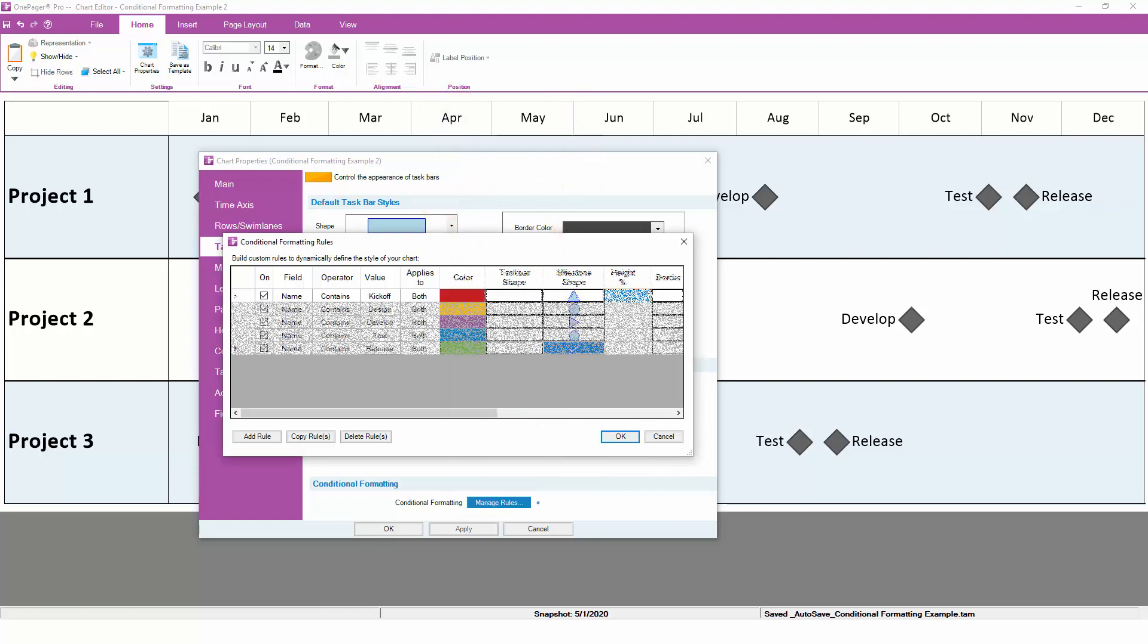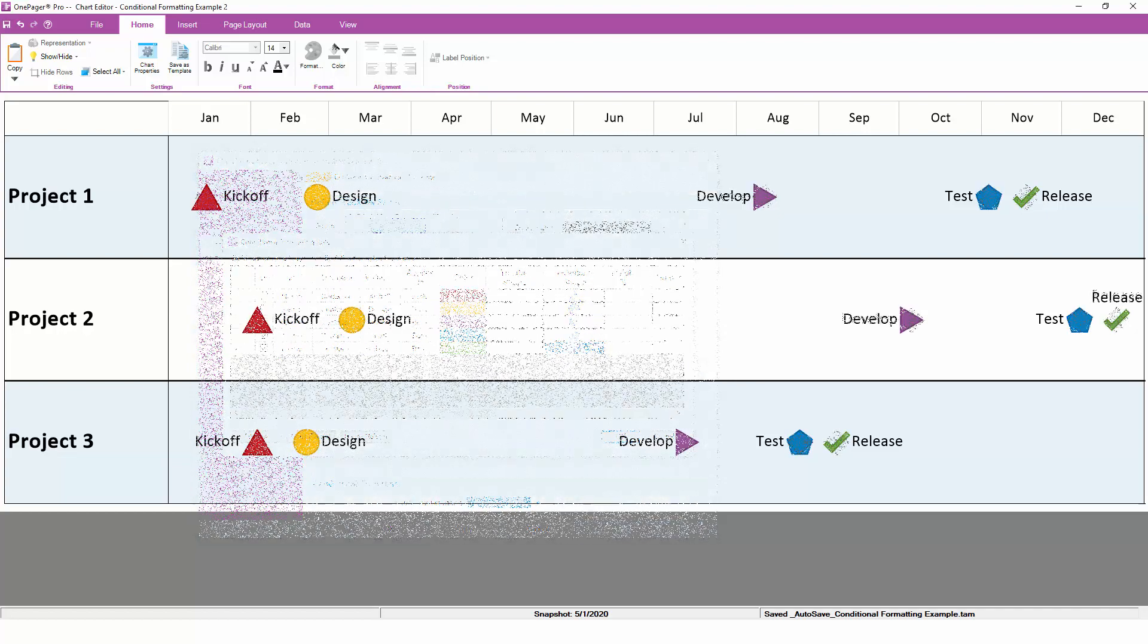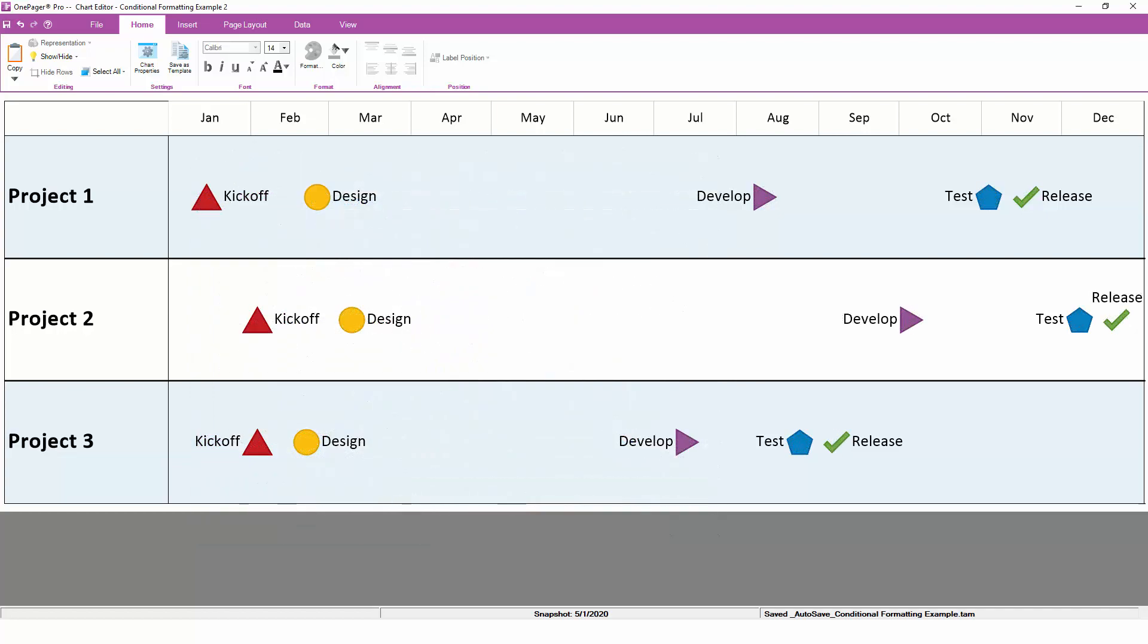Adding a few more rules, we can assign a unique symbol to each other type of milestone that's in the project. Once these rules are applied, the default milestone symbol goes away and is replaced with a symbol that is specific to the different phases of the project.